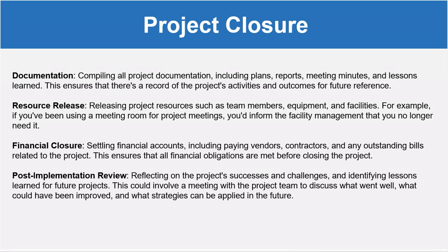Then financial closure means settling the financial accounts, like accounts payable and receivable, including paying vendors, contractors and any outstanding bills related to the project. This ensures that all financial obligations are met before closing the project.